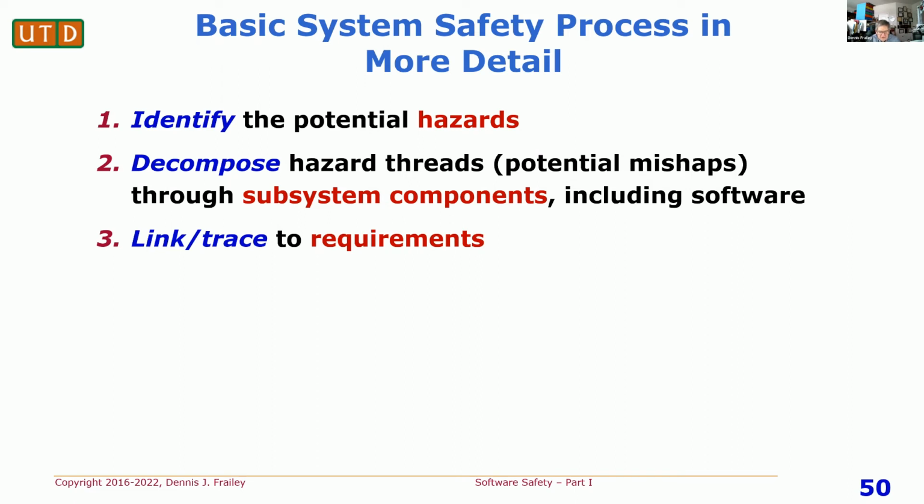The requirement might say something like never do this or always do that. And in the course of looking at steps 1 and 2, you may say, well, here's a situation where maybe we shouldn't do it that way. Maybe we should do it a different way. And so that may translate into a negotiation with the customer over what the requirements are. And sometimes that's the best way to solve a problem. Just slightly revise the requirements.